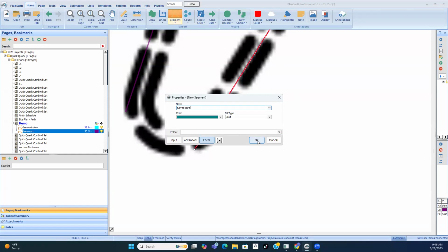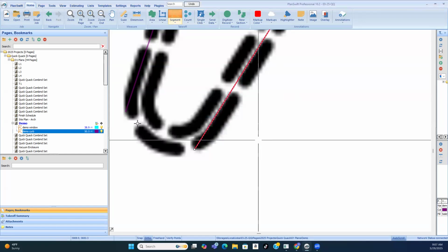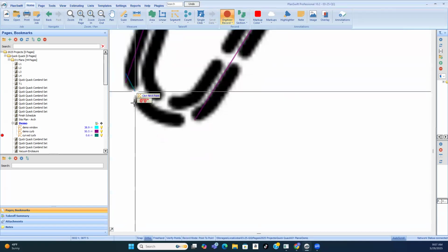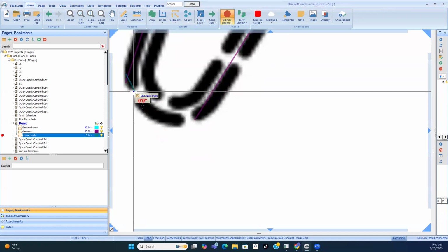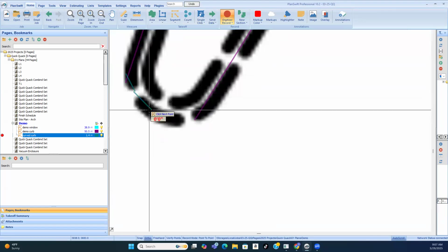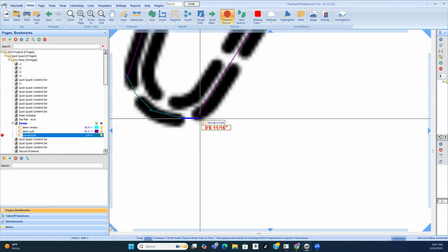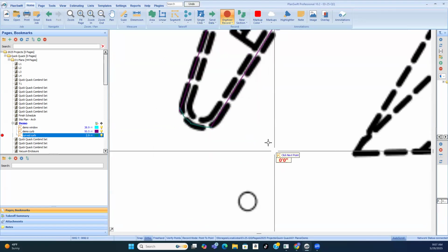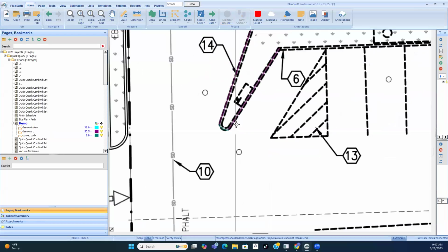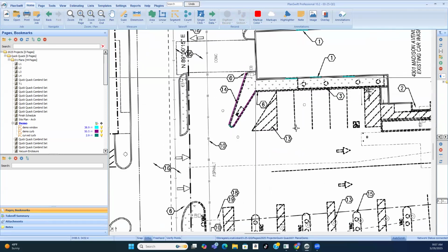It's more labor when it's curved, as opposed to when it's straight. So in general, when I know things are going to cost something different, I need to have a whole new category for that. Yeah, I mean, naming: you want to have a category for everything that you're demoing.